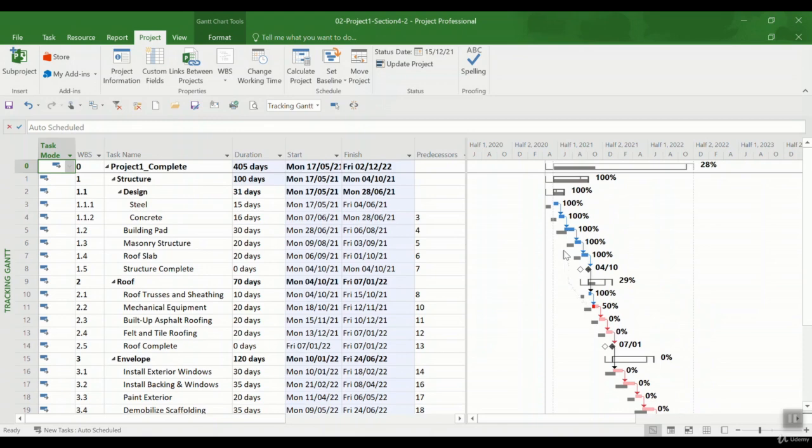The message that we saw is for the case where we have the actual percentage complete and actual start date. But if we haven't started the project and we want to shift it because of, let's say, a regulation or a permitting application, you want to postpone the project to a later date without starting it, you can click on Move Project and put the expected start date in order to shift your whole project schedule to another date. That's possible to do.